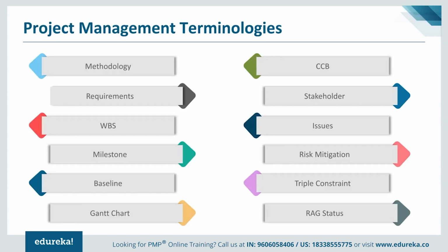Mitigation actually helps in reducing the impact of that risk. So as I mentioned, you're working on a new requirement and you're not very confident about it. One of the mitigation strategies that you decided was to increase the number of testing or test coverage or do more tests. If that is a mitigation plan that you have decided, then obviously you need to implement on that plan accordingly so that you can mitigate that risk. Otherwise, what will happen? Once you put that feature into production, and if it doesn't work properly, you will have a lot of production issues. So you'll have to ensure that you mitigate risk properly.